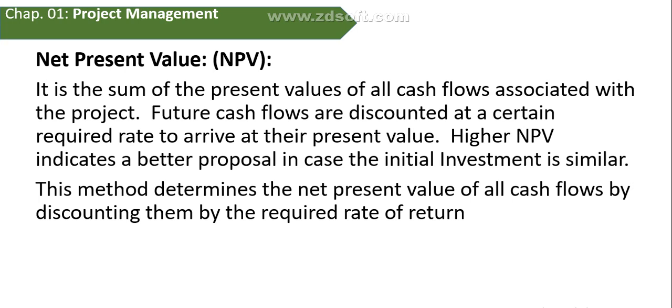Net present value. Net present value is the difference between the project's current value of cash inflow and the current value of cash outflow. The net present value must always be positive when picking a project. The one with the higher net present value is preferred. The advantage of considering net present value over the payback period is that it takes into consideration the time value of money, while in payback period we do not consider the time value of money.